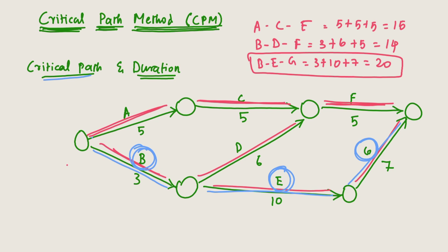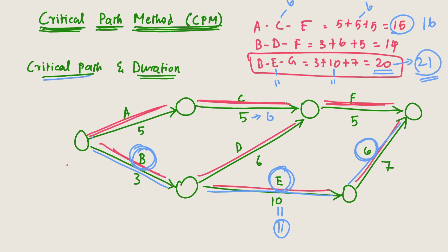For example, if we take activity C as 6 days, the total duration of that path becomes 16, but the project still completes after 20 days, so the delay in C does not affect the project. However, if we substitute activity E as 11 days, the total duration of B-E-G becomes 21 days, meaning the project completion duration becomes 21 days. That's why B-E-G is the critical path.